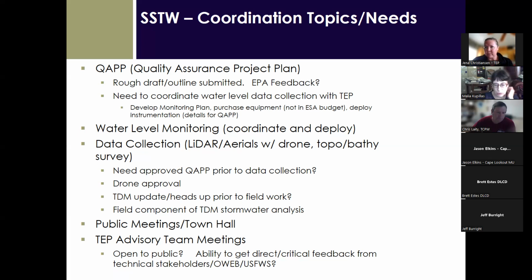I was gonna say, this whole system is really unique because it really is largely groundwater driven. That was one of the things that we learned. And I'd also like to point out one of our big data gaps is on the east side of Sand Lake Road, where we have the spring and Rinicky Creek, which now goes down and joins up with that one wetlands, and then flows underneath Sand Lake Road. We do not have any groundwater data for the water flowing into that wetlands area. So we don't know what its controls are if we're planning on doing any work over there like the past plans have shown. So we'll need to do something over there, maybe short term, but at least we need to look at it. Yep.